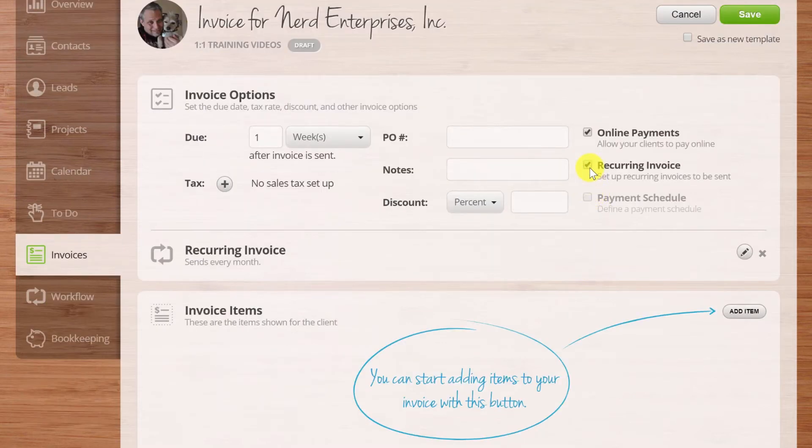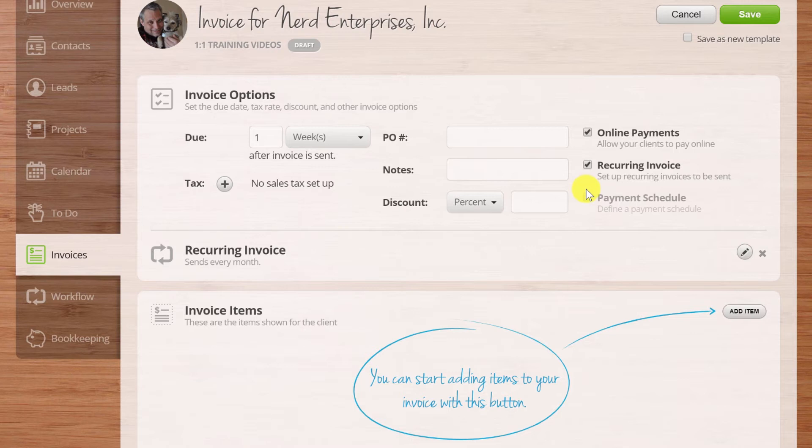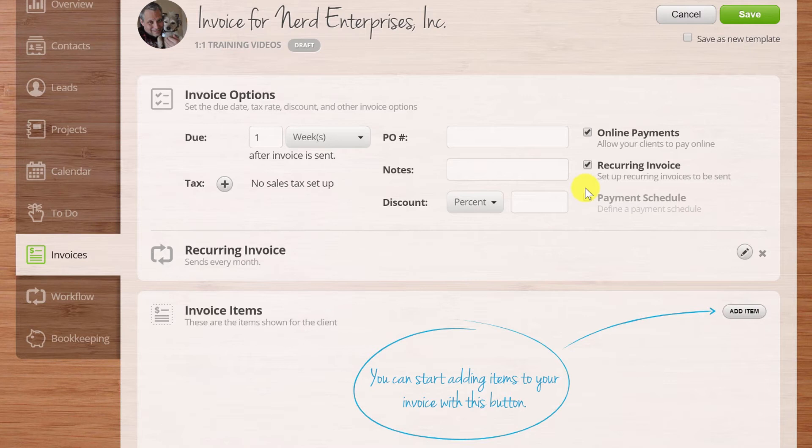What's nice is you can also define a payment schedule. If you have, let's say like a construction project, is the most common example of that, where you're going to have a contract amount. Let's say the project is going to be for $150,000 and they're going to pay 25% up front, and then you do progress billing so they're going to have a payment schedule where they're going to pay the project off in pieces. And then the last thing is the retention that they have to pay you based on taking 10% off of each invoice so that your client can make sure that you've completed your last punch list before paying you in full.